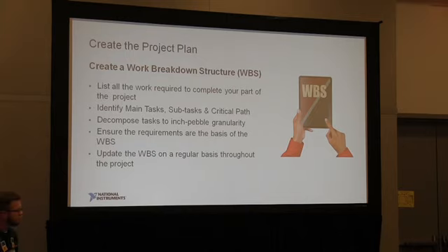path. Many times tasks can be completed in parallel. Bring somebody else on and we can get things done in parallel, but there will be a set of tasks that must be done in series, and that will become your critical path. Those items get your highest attention to make sure that there aren't delays and they get implemented on time.